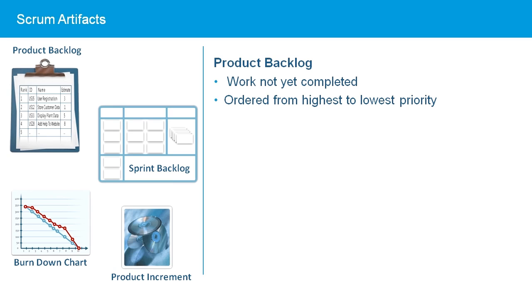Typically, the user stories are quite large when they are added to the product backlog, capturing a broad feature like allowing a customer to buy products from a website. This type of user story is too large to estimate without breaking it down into several smaller, more manageable stories. This is done by the product owner and the team during the product grooming meeting.